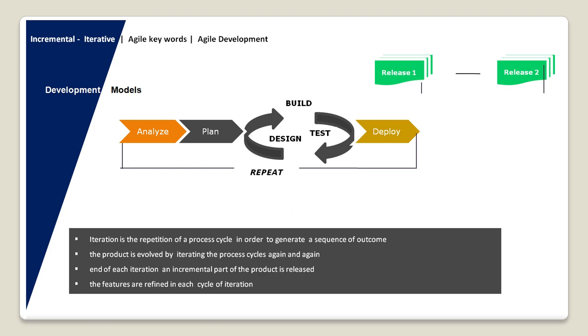In Agile, we apply each iteration purposefully to improve the previous version, and each iteration is executed with a certain plan. They are not executed unplanned or with no planning. In Agile, every cycle or iteration should end in a clear situation. That means it should produce a usable end result.